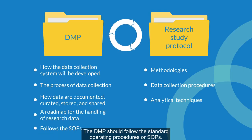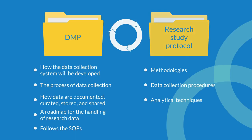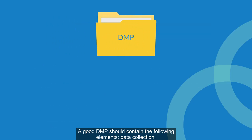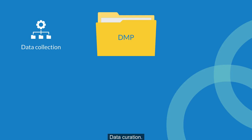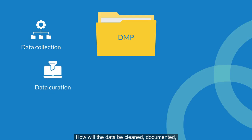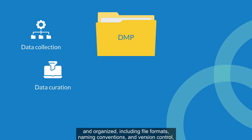The DMP should follow the standard operating procedures, or SOPs. A good DMP should contain the following elements. Data collection: what is the source of your data, in what formats, and how much data will be produced? Data curation: how will the data be cleaned, documented, and organized, including file formats, naming conventions, and version control?